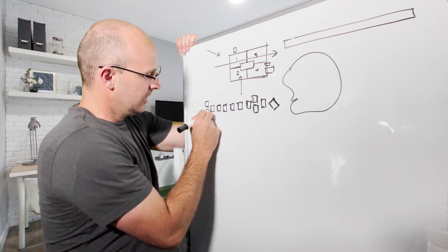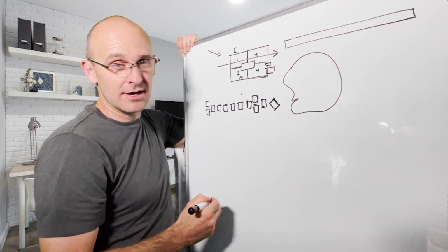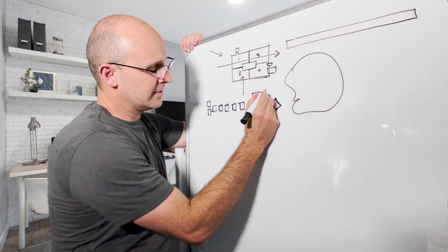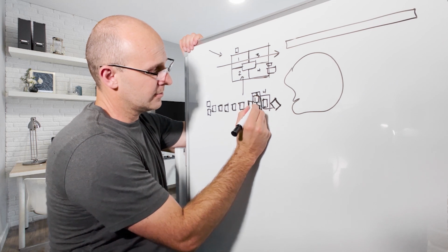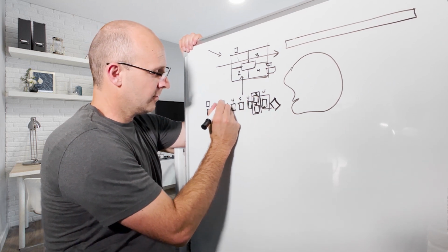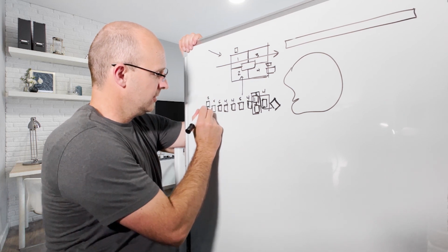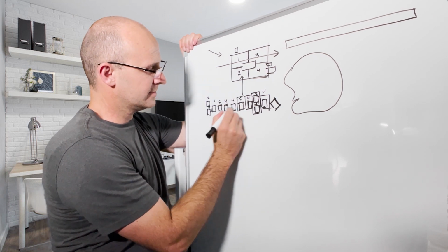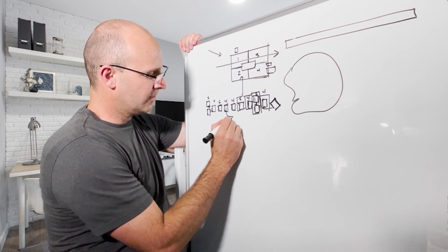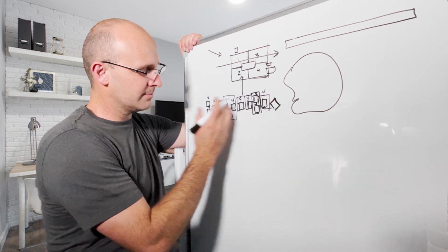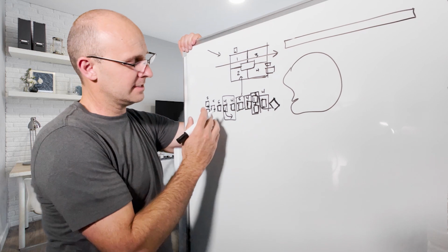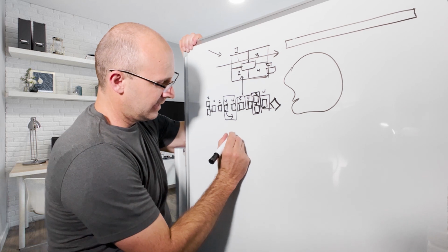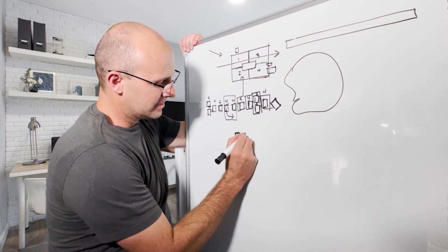So what I do is I start to look in here at Takt time and say, all right, if I know my sequence, so we package this one together. Let's say we know the durations, like maybe this is 4, maybe this one is 2, 3, 4, 5, 4, 4, 5, 5, 2, 4, right? I'll start to package these together. This is its own right here. This is its own. Turns out these, when we analyze it, can go together. We'll package those together. So basically from the pull plan, I'll start to package these things into what's called Takt wagons. And the Takt wagons then become the individual Takts inside the Takt sequence.